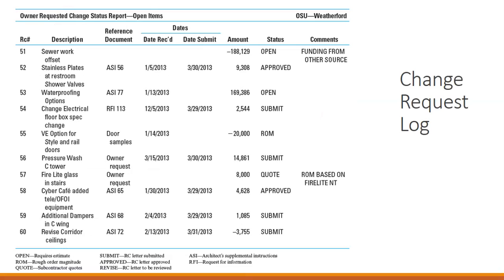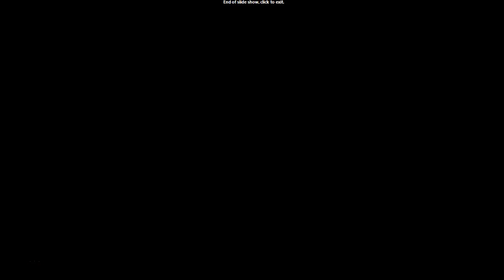This is an example of a change request log. So when was the change requested? The date received, the date submitted, the amount, whether it was approved or it's still open, any comments that came along with that. And that is the end of